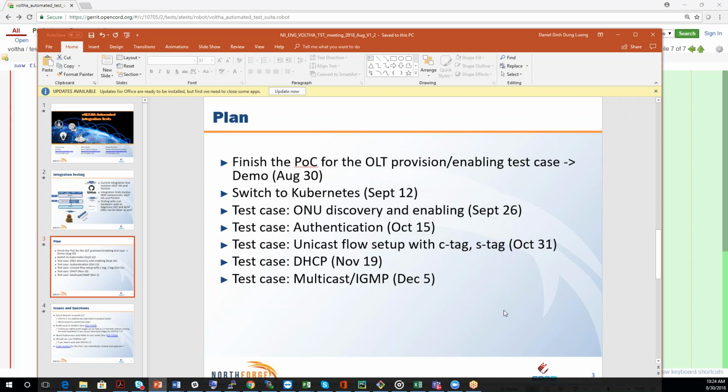Sean, I was going to make a suggestion and see if this is palatable. In terms of priority, it's the last item slated for delivery on this plan from Northforge. So I think that has the prioritization in line with what you have. Rather than removing it from scope, maybe just state a dependency on the functionality, and if the functionality isn't there, then it would be deferred until the functionality is available for testing.